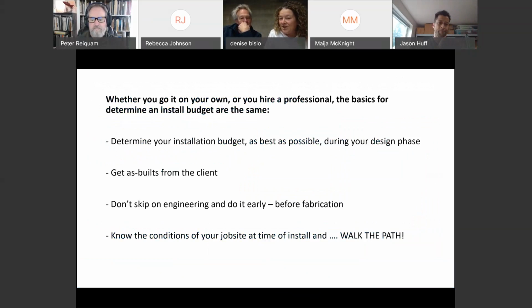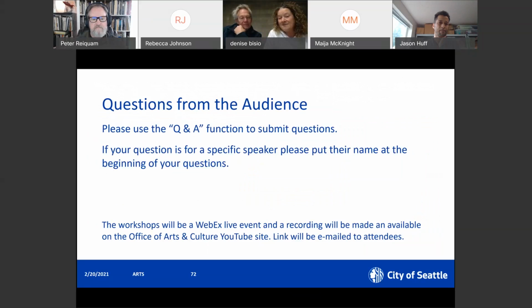Determine your install budget early. Get your as-built from the client. Don't skip on the engineer. Do it early and ideally before fabrication. And know the conditions of your job site at the time of install. You want to walk that path. Next slide.